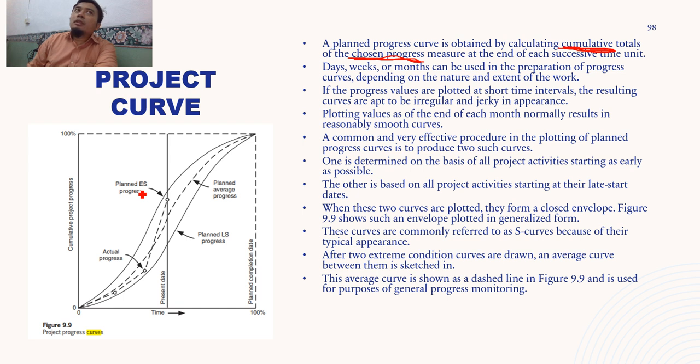Physical curve is based on the percentage of the work, how many days are allocated for each task. Basically, the duration of each task. The idea is that if a task has a bigger duration, it means that task is very critical to the project and contributes a large percentage of completion to the project. So physical curve is one thing, financial curve is another aspect.